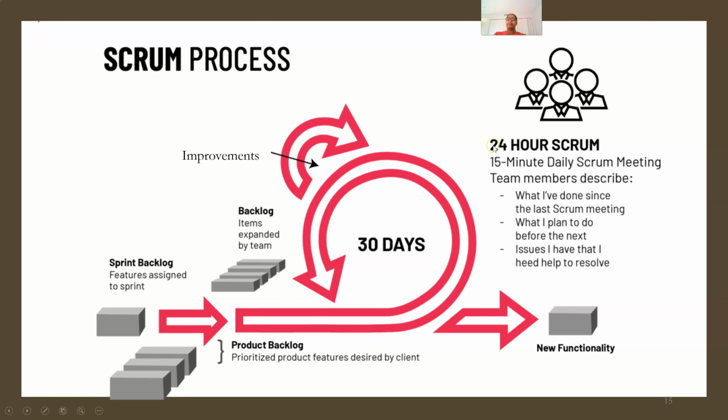So every day the team meets for a daily stand-up meeting or daily Scrum meeting. It is also abbreviated as DSM. The team members would be describing three major points. That is, what have you done yesterday? What has that particular team member done yesterday? Are there any roadblocks for today? And what is the plan for today? Or if there are any issues or blockages for whatever task has been done. And finally, what is the plan for the current day?